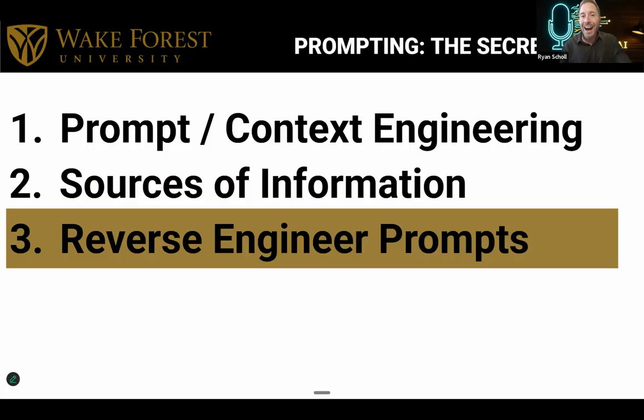What I did is I gave it an old project and I said, create a charter that looks like this. I'm going to give you new input, and I want your new output to look like this old project. So it went through and I iterated probably 15 or 20 times with it. I said, no, change it a little bit here, change it a little there. You do that over and over until you get output that matches your expected output. And then you can use it for all new projects going forward.